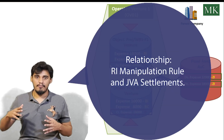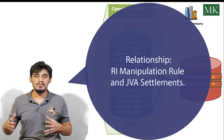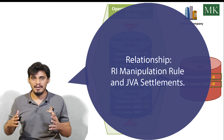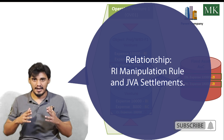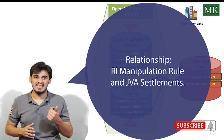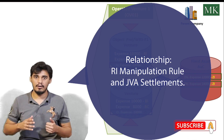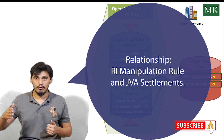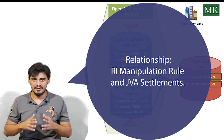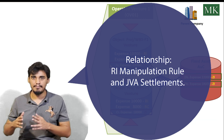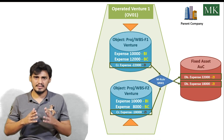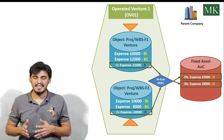For this, we will use the recovery indicator manipulation rule M001, which is assigned in the allocation structure in the settlement profile for the project. This assignment is done in the PS module configuration.